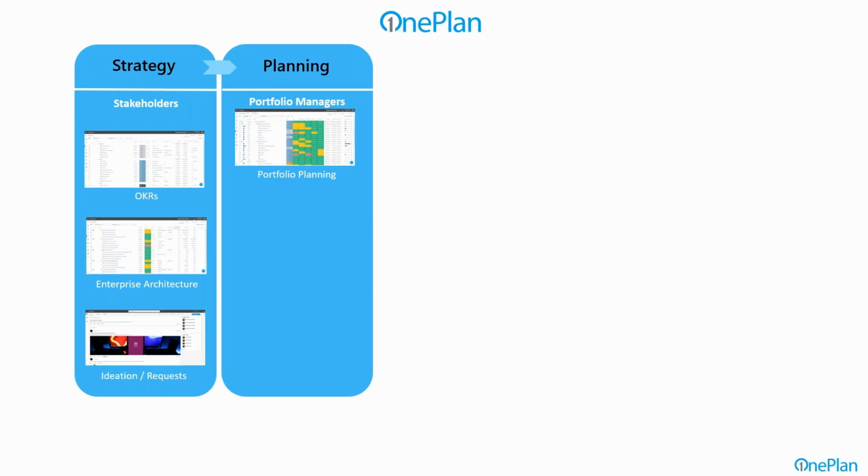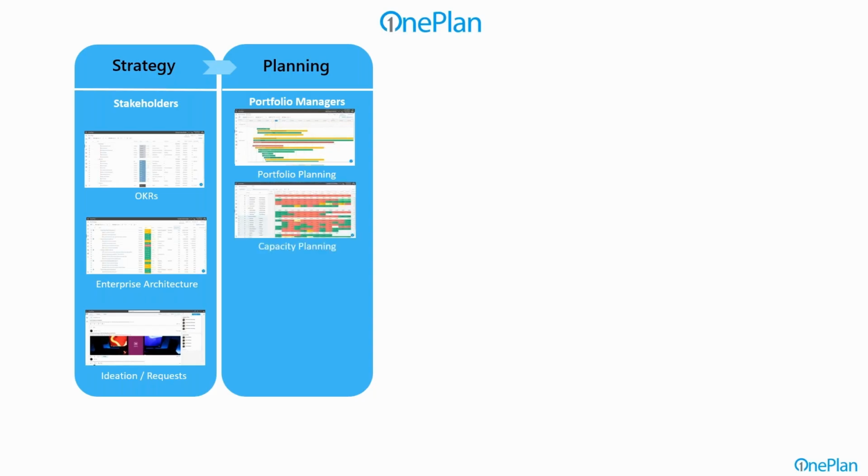And they can look at them more in traditional list views, more board views like we talked about for the more agile oriented people, and roadmap views for the more delivery and product oriented types of folks. All the same data, but with different perspectives across the board. Important is, if we're going to approve things and commit to things, we need to understand, do we have the capacity to deliver? And across the board, across all projects, whether they're coming from Azure DevOps directly, or whether they're being done in, say, OnePlan or another tool itself, having it all brought together into OnePlan gives us a comprehensive picture of what our commitments are, and do they exceed our capacity or our ability to deliver?